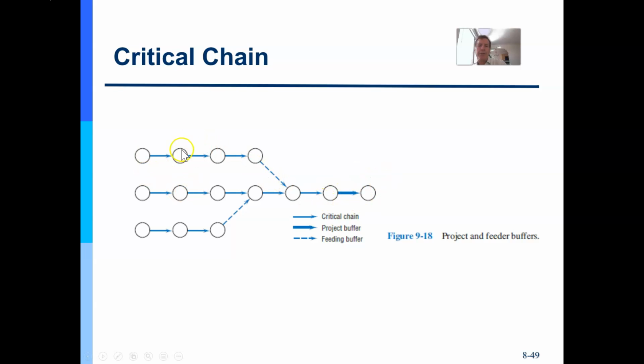Any buffers from these activities that you cut in half, you would add them up out here after the project and measure how much you're using of your buffer. If you're using more buffer, say at this point in the project, than you had allotted, that's an issue, and you probably want to go back and re-estimate is what I would do.